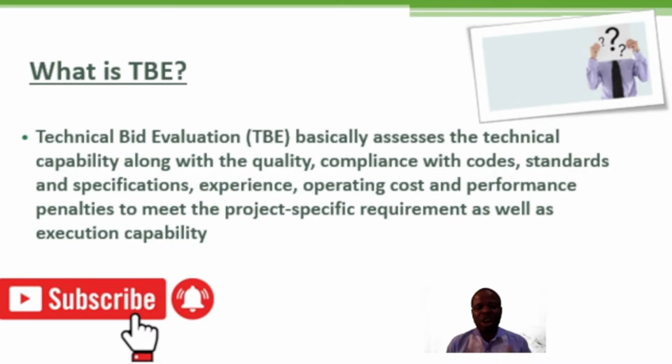You also look at the experience, the operating costs, and the performance penalties, to meet the project specific requirements as well as execution capability. So whether for a complex procurement or a more straightforward contract, you need a well-planned and implemented bid evaluation process, because you don't want to be the engineer responsible for installing noisy equipment.